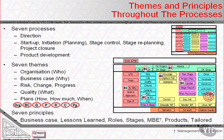No conversation about business case is complete without also considering the risks involved. As we consider the outline business case, we consider the known risks. As the project board reviews it, we consider the risks. As we build the proper business case, we consider the risks — now in the light of the strategy for how we will handle risk.